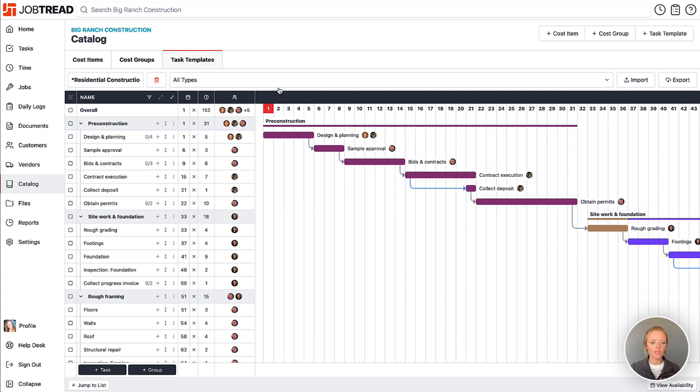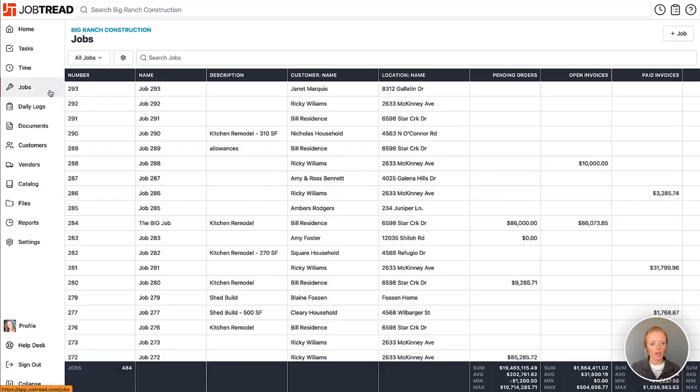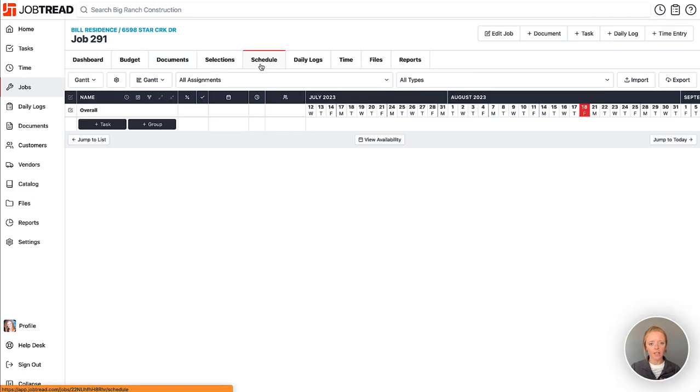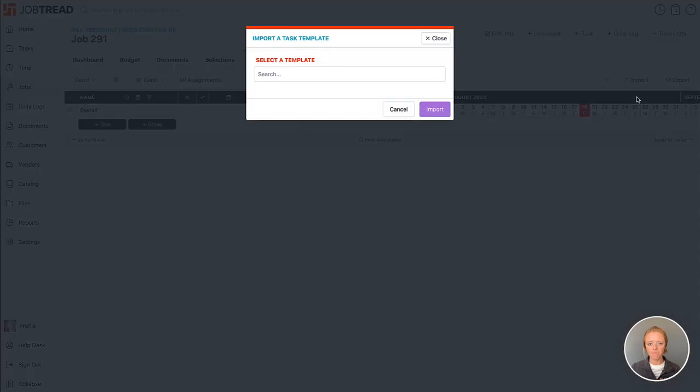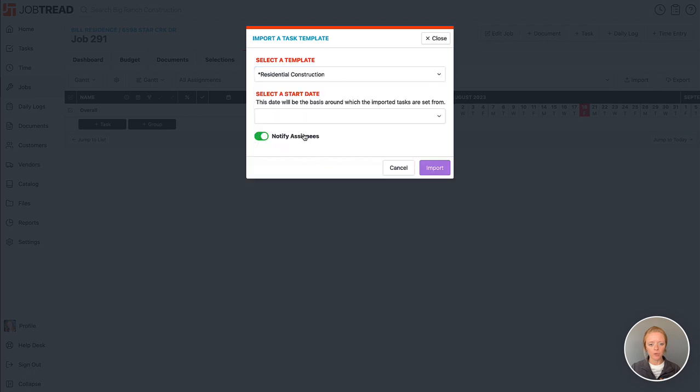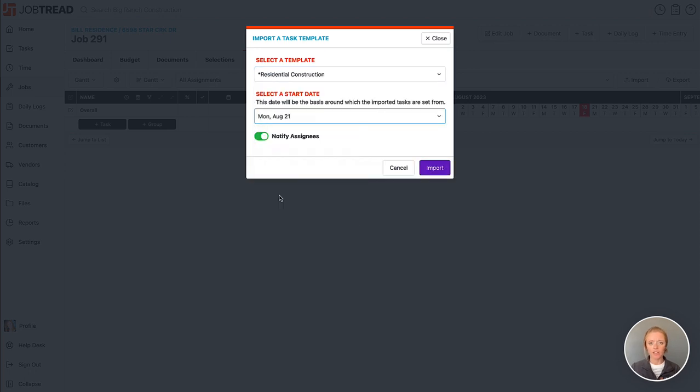Now once you save this task template, then you can go into a job and go to the schedule tab, and now we can import this template. Import from template, and then we'll choose our residential construction one. And now I'm selecting the start date. The start date is going to be that day one on the template. All the other tasks will be scheduled accordingly.